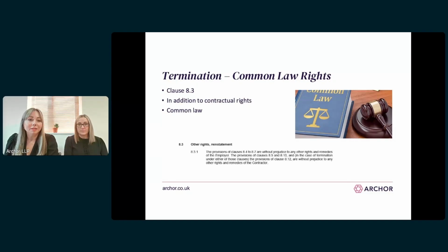So the most common example we see of this is abandonment of the works. So where the contractor just doesn't turn up to site to carry out the works, this may entitle the employer to terminate using its common law rights rather than the process set out in clause 8.4. Now, the advantage to this is that you don't have to wait your 14 days for the specified default to see if they improve it. If in this example, the contractor has abandoned, the employer can immediately terminate using their common law rights for abandonment.